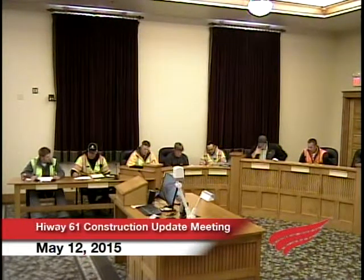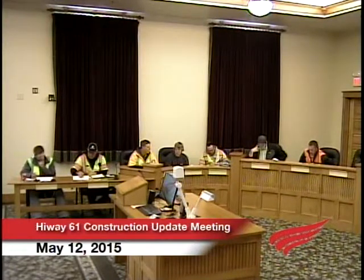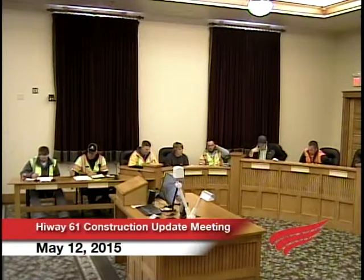We also have a restoration crew on site, so they'll be prepping the road for asphalt paving. Week 2 of our schedule would be getting the Broad intersection ready and bringing that up to Dakota. Right now we're planning on paving the Broad Street intersection in week 3 of our 3-week look-ahead schedule.